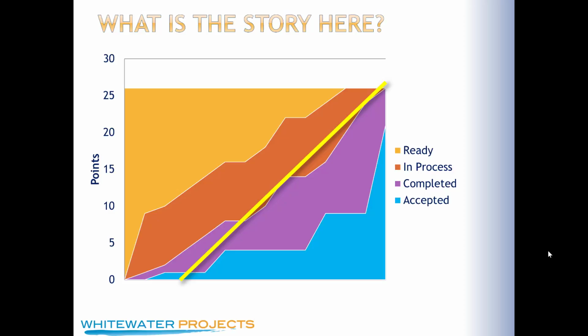Because nobody wants this herky-jerky kind of motion, because when the team is finishing all this here, they've got a large gap of things that are completed but not accepted. And that causes stress because they're not sure whether it's actually going to meet their product owner's acceptance, right? Did we build what you wanted? Not sure. So that's a danger there.